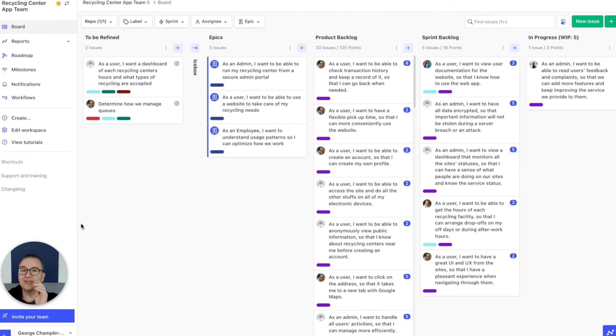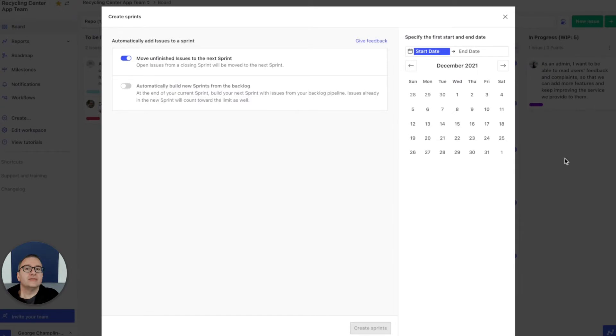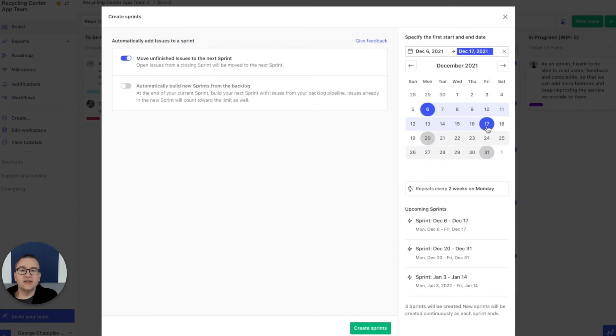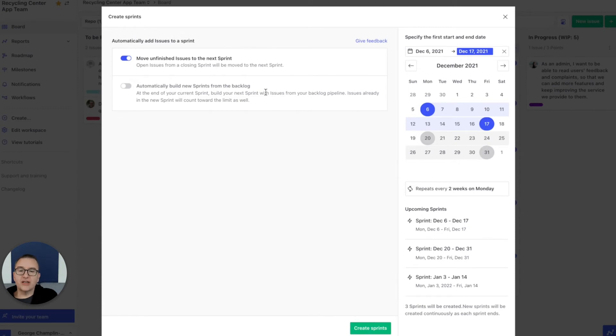Okay, this team works in two-week sprints. We'll set those up starting on Mondays, ending on Fridays. The schedule will repeat for us automatically. Now remember that prioritized backlog? That's what's going to feed the sprint.